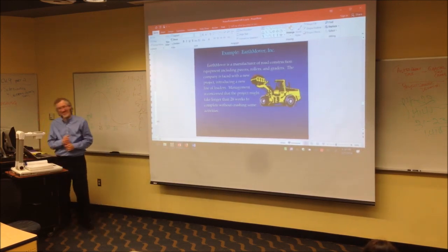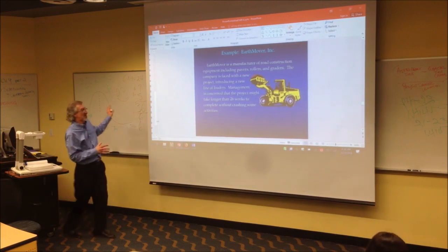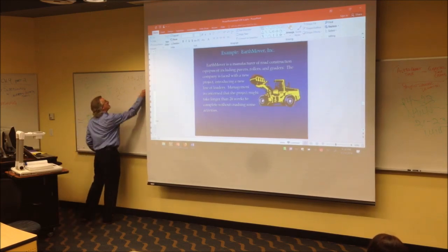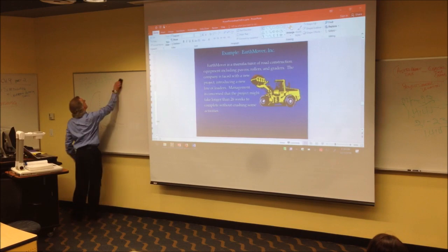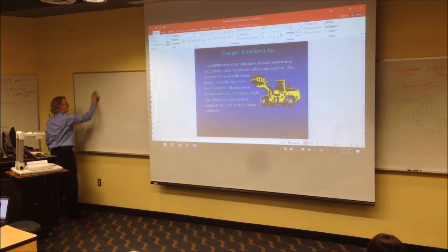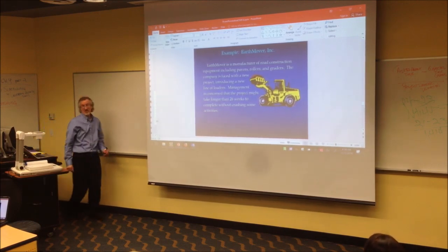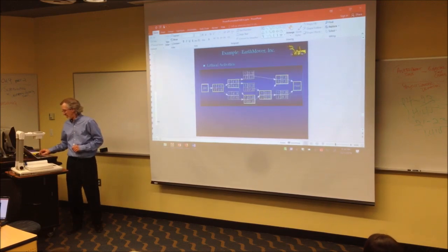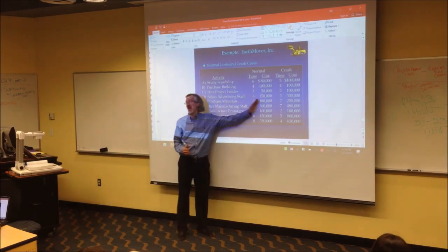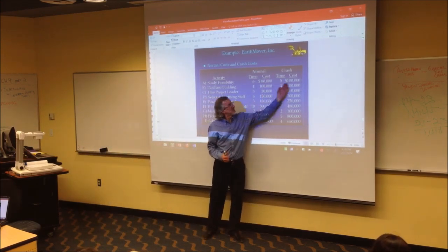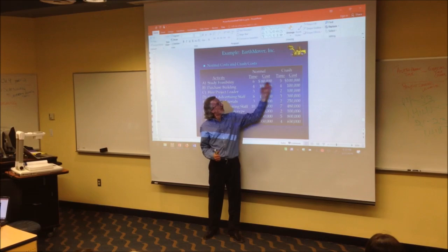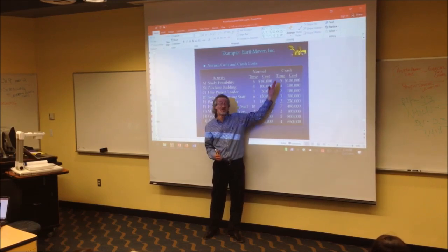Crashing, crashing, crashing. All right, where do I want to put this? Can I erase this over here? Everybody okay with this? Here we go. Now, my hint on crashing is that I always start by forming two columns and do some calculations right off the bat. This will make sense in a minute. Because all crashing problems look like this. I start right off the bat by finding the difference from regular cost to crashing cost, and finding the difference in the amount of time we'll save if we spend that extra money.